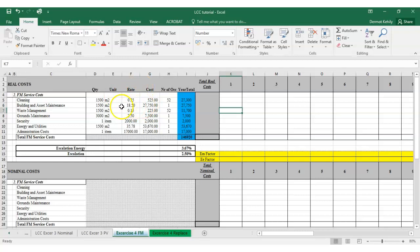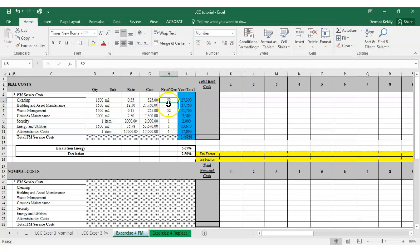We've got a similar setup to what you'd see in a cost planner bill of quantities: unit, rate, and quantity. So cleaning at 1,500 metres squared at a certain rate gives our cost. The same goes for building and asset maintenance, waste management, and so on. The rate doesn't have to be per metre squared — it could be per lump sum, per item, per metre cubed, or per unit, just like in a cost plan. Quantity times rate equals cost.